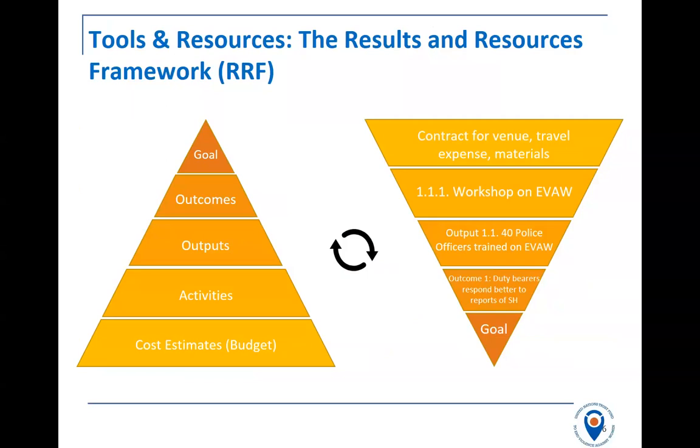So you would mark on the invoice that 30%, a third of it would go to activity 1.1.1, a third of it would be 1.1.2, and so forth. So we're not asking you to... there are ways that you can make bulk buys and still split the cost across activities, but it must be clear how that division is made. A good way of doing it is to mark this on the invoices and receipts and documents, and keep everything in the filing, which I'll make a suggestion of later.